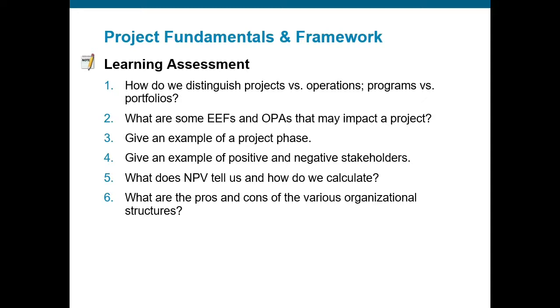What are the pros and cons of the various organizational structures? In a functional organization, the team member has a job that they can go back to when the project is over, but the project manager may not have the full skill set to run and coordinate the project in an efficient manner. In a project-oriented organization, the project manager has a very high level of authority, but the downside is the team members may be on the bench or have no work when the project ends.